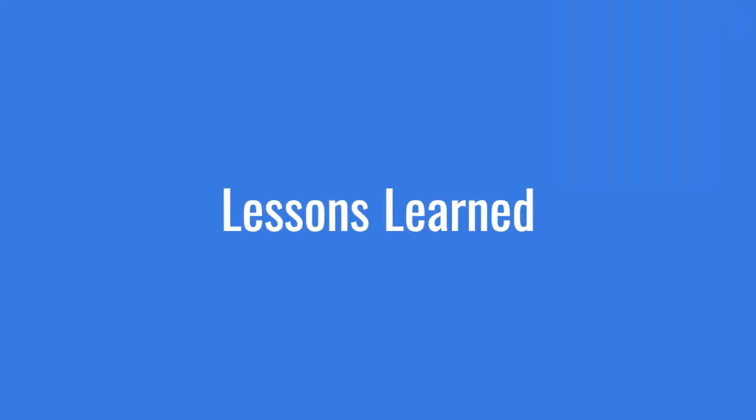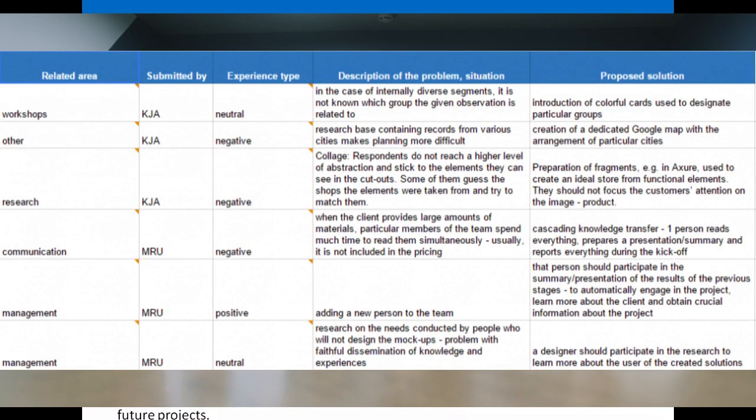Next is lessons learned. That means capturing and documenting lessons learned throughout the project for future improvements related to risk, conducting post-project reviews, gathering feedback from stakeholders, and documenting successful and unsuccessful risk management strategies so that you can do the positive things in future and avoid the negative things. The output is the lessons learned document for use in future projects. This is a very important document, lessons learned.